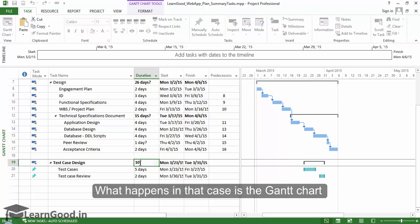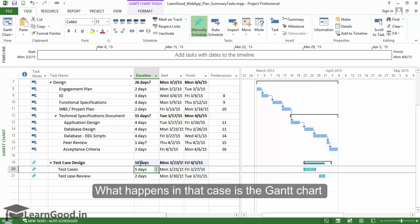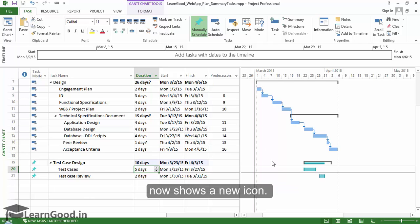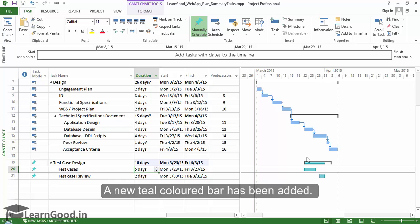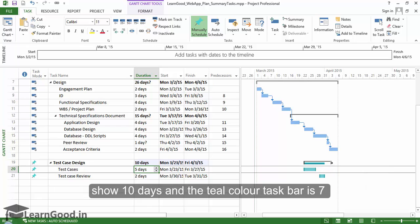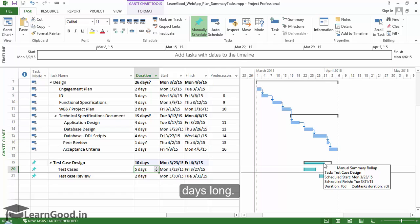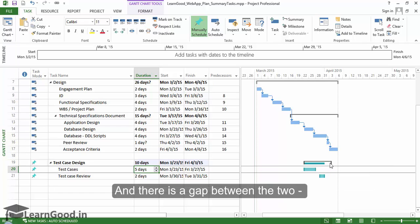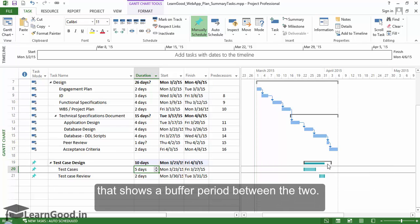What happens in that case is the Gantt chart now shows a new icon. A new teal colored bar has been added. You can see the black bracket has expanded to show 10 days and the teal color taskbar is seven days long. There is a gap between the two that shows a buffer period between the two icons.